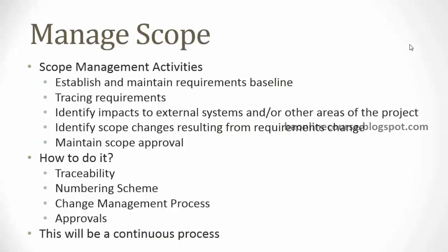According to me, regarding the traceability matrix, there are three kinds of requirements, which are broadly classified as business requirements, user requirements, and solution requirements. Business requirements are high level statements, like vision and scope, and they cannot be directly implemented. So somehow we have to trace them till the solution requirements. In between fall the user requirements, which act as a bridge between the business requirements and solution requirements. These user requirements express how the user needs to interact with the solution to meet the business needs.